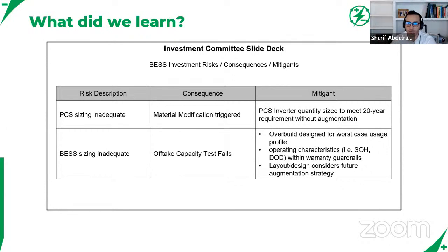So when it comes to degradation, as an engineer, I personally like to be more conservative. If I think I'm going to be performing 3 use cases, I want to build that into the usage profile I'm developing. And if I end up using fewer use cases or doing less of each use case, that's fine. But it's better to overestimate than to underestimate the amount of usage you're forecasting. So yeah, that's one thing I'll mention there.